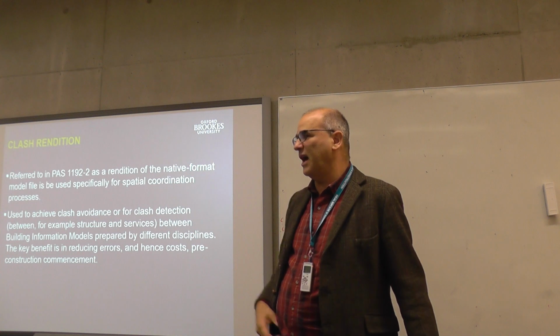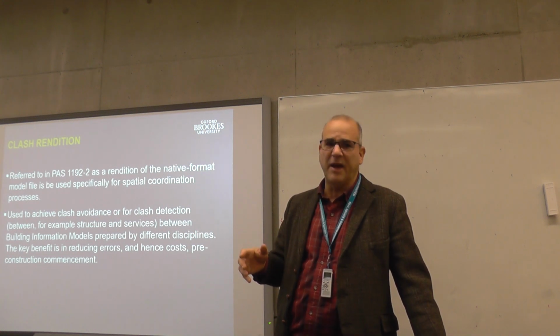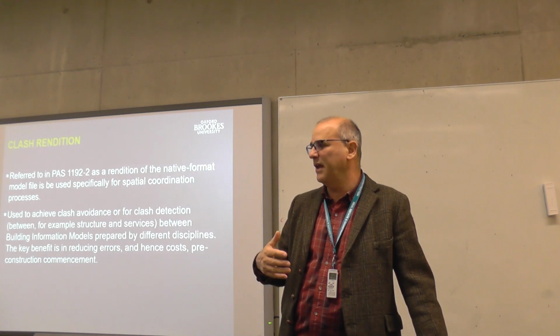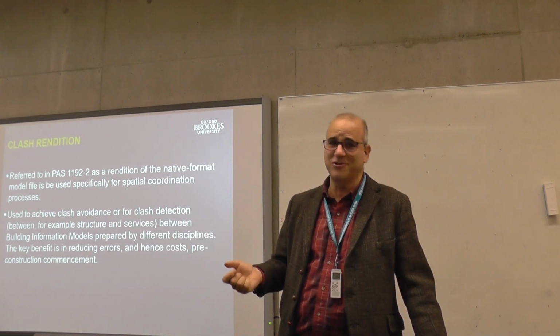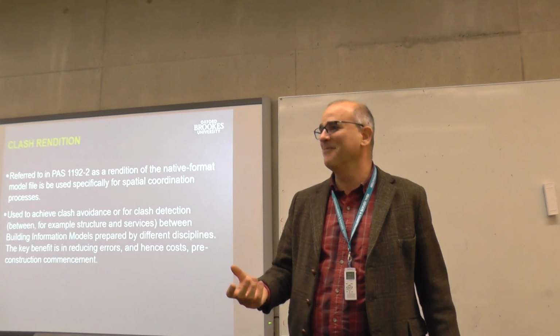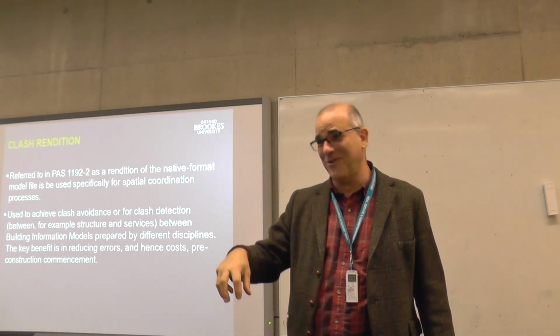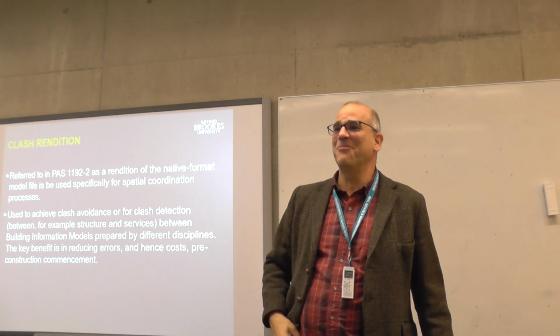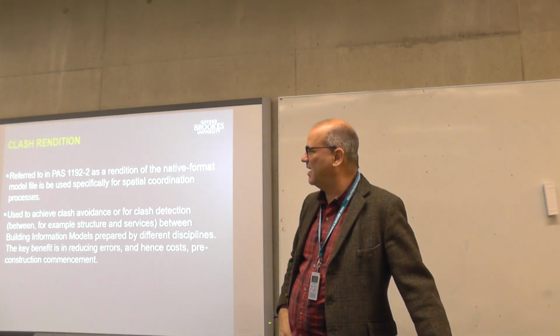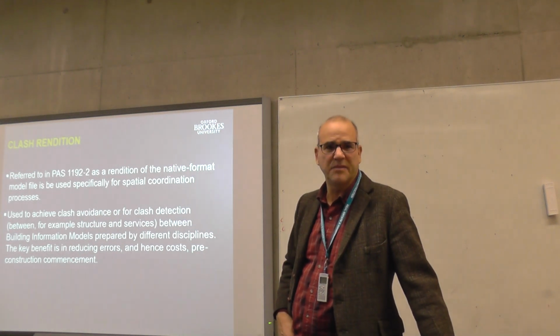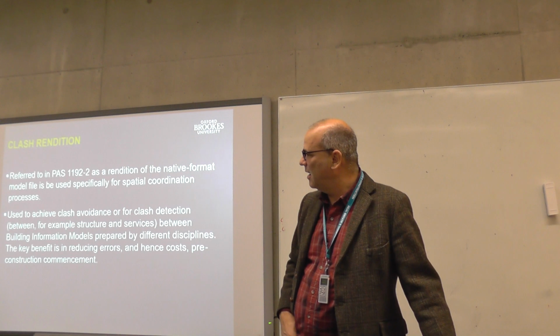There are issues not only with three-dimensional space, but clash detection when it comes to programming and the time element of it. Should you install the stairwell first before you build the building around it, or should you leave a hole in the roof so you can drop the stairwell down? And this is particularly relevant when it comes to modular construction, which everyone seems to be doing these days.